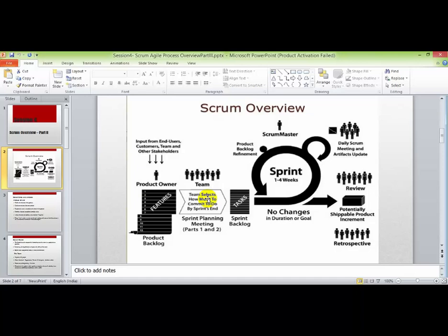Finally we come to one conclusion that we are going to implement these particular user stories or requirements in this sprint. Once we commit to that, at the end of the sprint we have to make sure that all these requirements are completed. If they are not completed, they will spill over to sprint 2. Whatever task is pending will automatically be added to sprint 2. So this is the process for your Scrum.